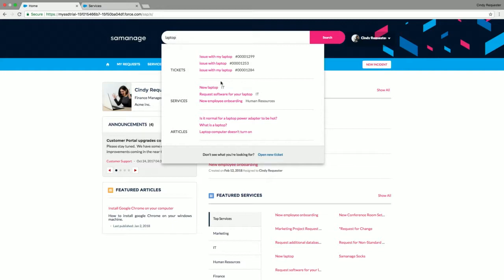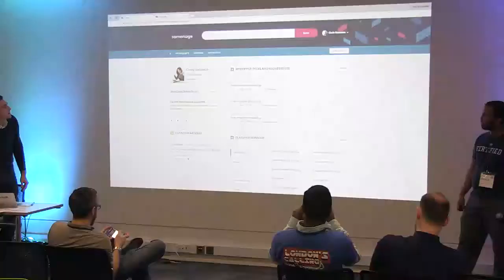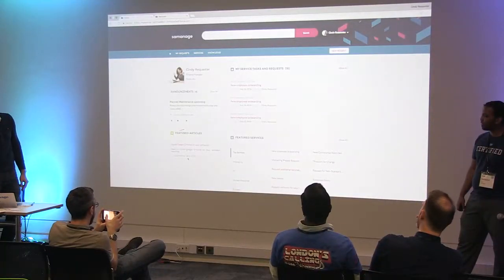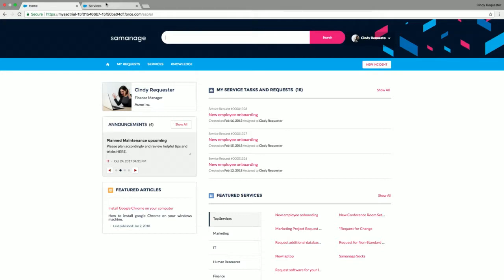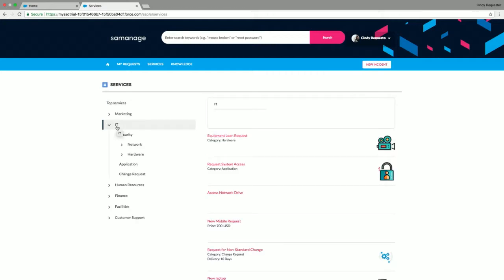There are two ways of doing a phased approach. You could either move a business unit to Lightning, one at a time. So for example, you could move your sales team to Lightning or your service team to Lightning, or you could group all of the functionality into a logical group and move that logical group to Lightning one at a time. So it really depends on your org structure, your internal business process, and what impact it will have on business as usual. One of the downsides of a phased approach is that some users, especially those whose functions overlap multiple business units, may have to use both UIs at the same time. So they will end up switching between Classic and Lightning.